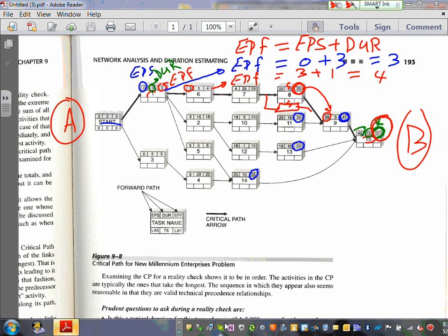So now, this path went from 29 plus 10, 39, to 29 plus 5, 34. This went to 34. So now the project went 5 days less. That will get me from 42 to 37. So 37 days, plus 10, it becomes 47. I can deliver the project in 47 versus 52 days, Adam, by relieving that critical path.